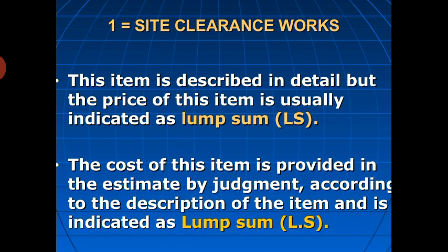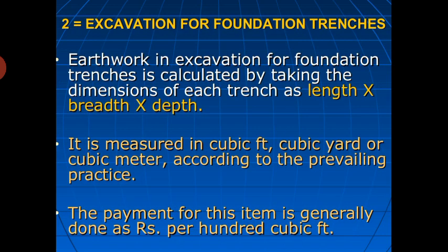Then the site clearing works you have to include as lump sum. That lump sum we already discussed in the last class. When you are clearing it, there is no provision in your estimate sheet, but it has to be added in the lump sum part.